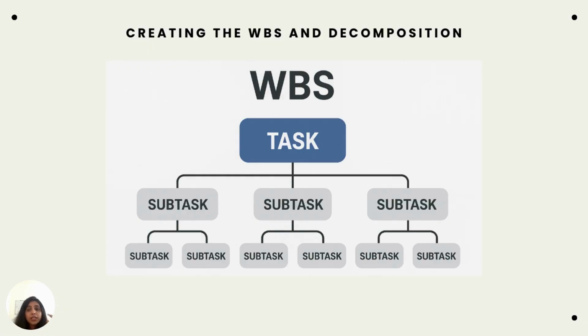It's organized by deliverables and not actions. Keep in mind, it's organized by deliverables and not by action. The WBS represents 100% of the project scope, no more, no less. We don't want to have scope creep.